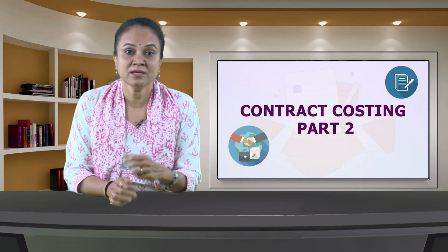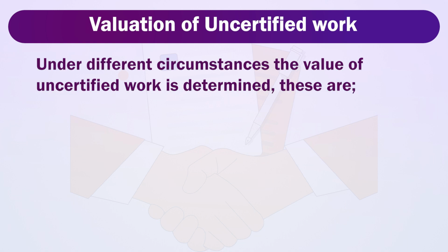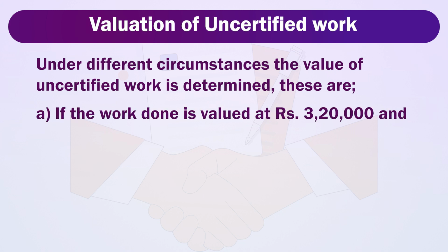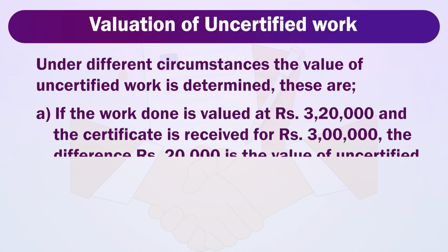Now, let's understand valuation of uncertified work. Under different circumstances, the value of uncertified work is determined. These are: first, if the work done is valued at rupees 3,20,000 and the certificate is received for rupees 3 lakh, the difference, rupees 20,000, is the value of uncertified work.